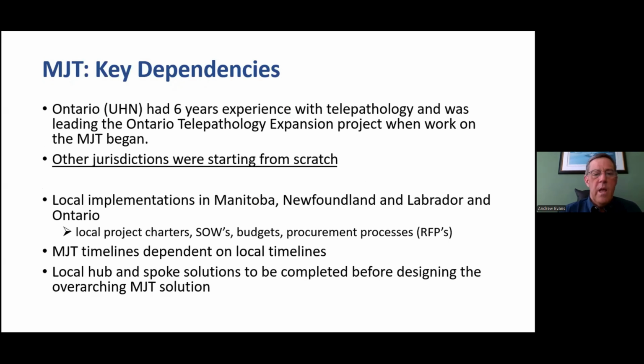Ontario, I think it's fair to say we had at UHN 6 years of lead time experience in digital path. So we took a lot of things for granted in terms of navigating some of the early pain points. They were in the rearview mirror for us, and we were well out in front of the other sites. So there was recognizing these other jurisdictions were essentially starting from scratch. There was a disparity in digital pathology experience, which I think did impact how the project rolled forward.